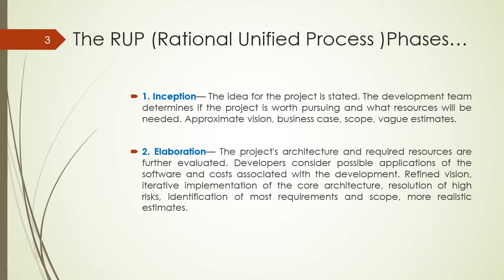The second is the elaboration phase. The project's architecture and required resources are further evaluated. Developers consider possible applications of the software and costs associated with the development. Outputs include a refined vision, iterative implementation of the core architecture, resolution of high risk, identification of most requirements and scope, and more realistic estimates.